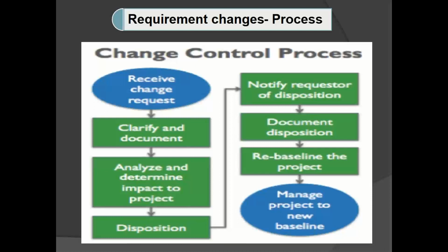Okay. Then third point is conducting impact analysis. Once we have the discussion, we are going to conduct impact analysis. That means, in case we make these changes, on what requirements and in which modules it is going to show impact, whether it is showing any impact or not.